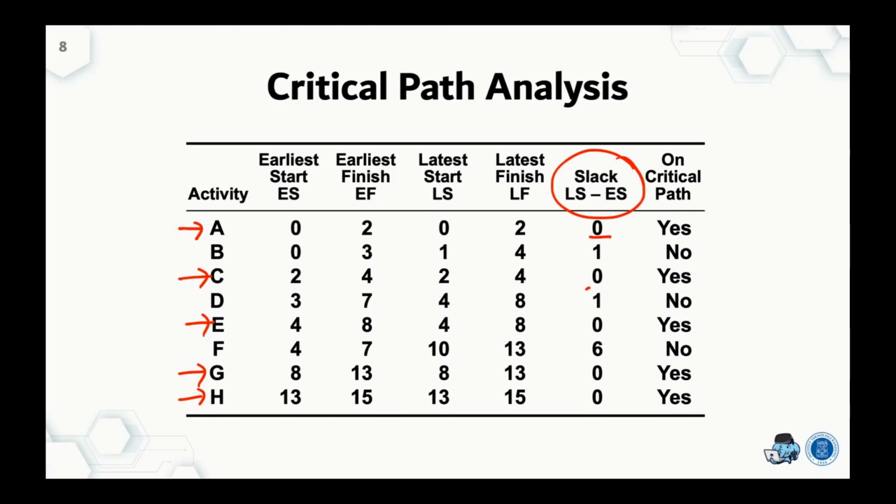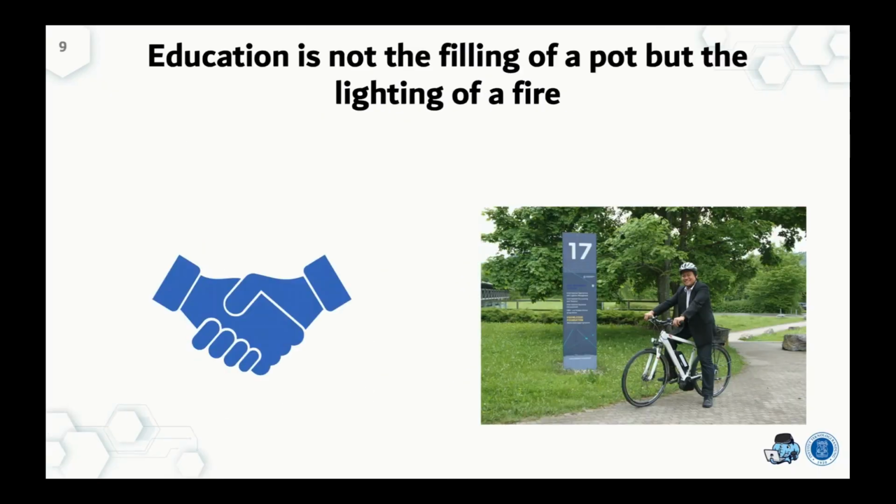You may see here they all have zero allowance. So when any one of these activities is late, the whole project completion is late.